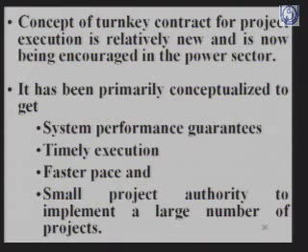And since I am giving the major role to the turnkey contractor, my responsibility as an employer or as a utility reduces to a great extent, and with my limited manpower, I can execute a large number of projects, because I am delegating a major part of the work which I was doing as a unit rate contractor, transferring it to the turnkey contractor, and in turn I am expecting certain things much more than I can do for myself.